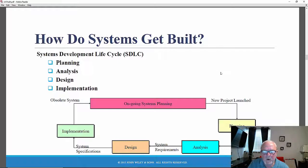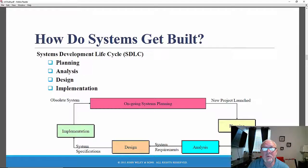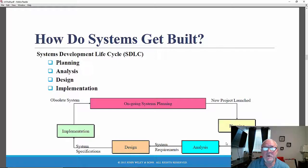So how does this work? There are phases that consist of steps, techniques, activities, and deliverables. Each phase has one or more formal deliverables that must be developed, submitted, and approved by the approval committee before you can proceed to the next phase.